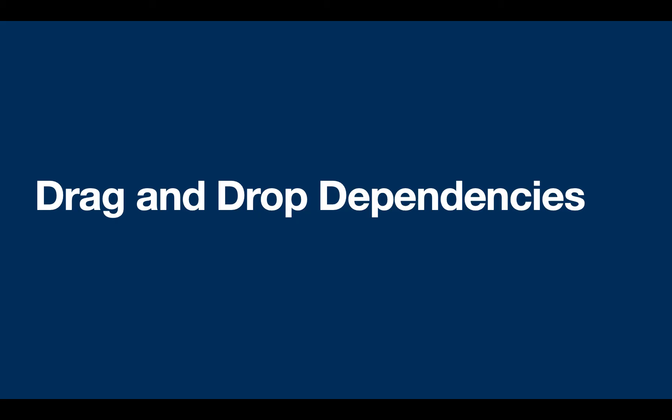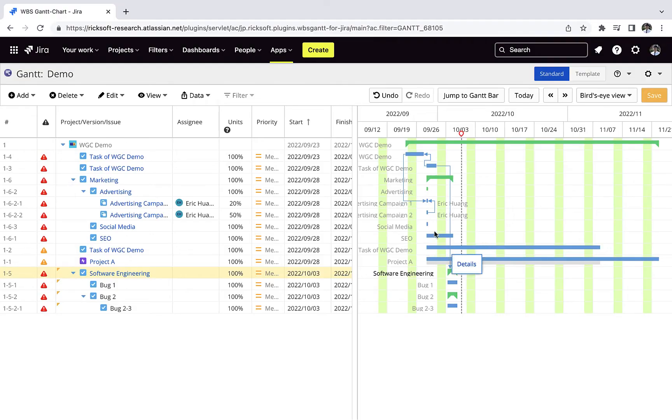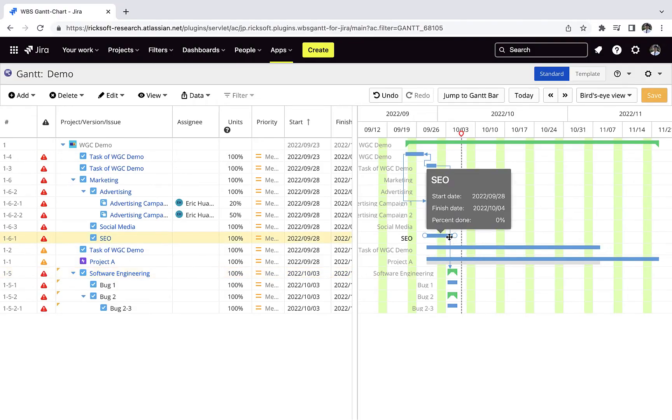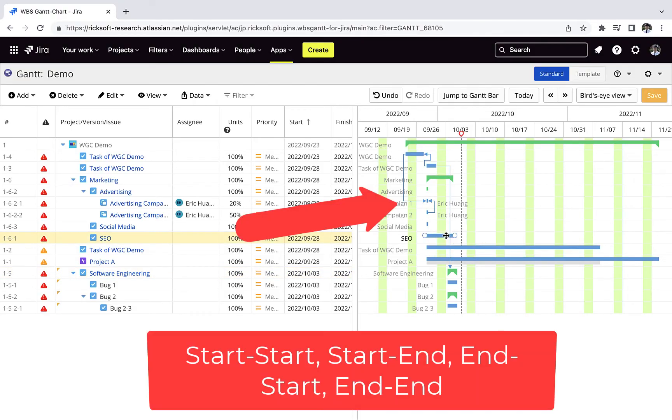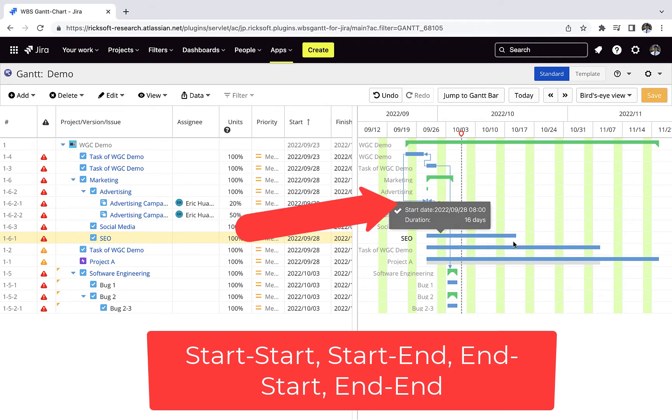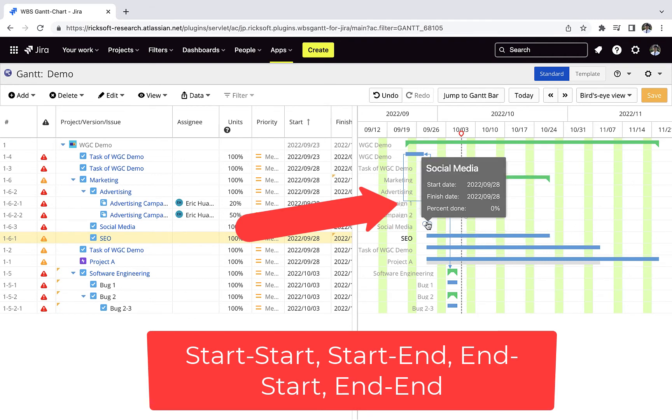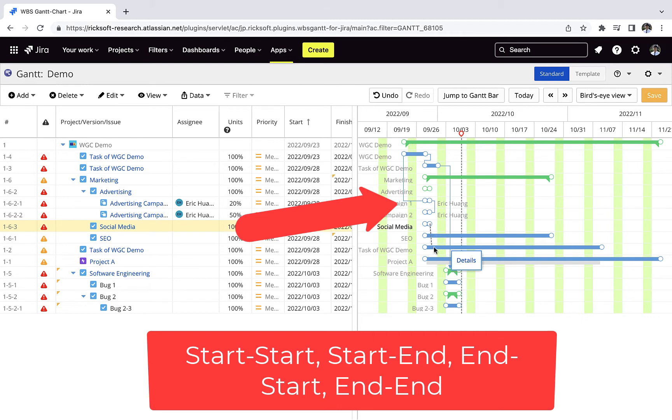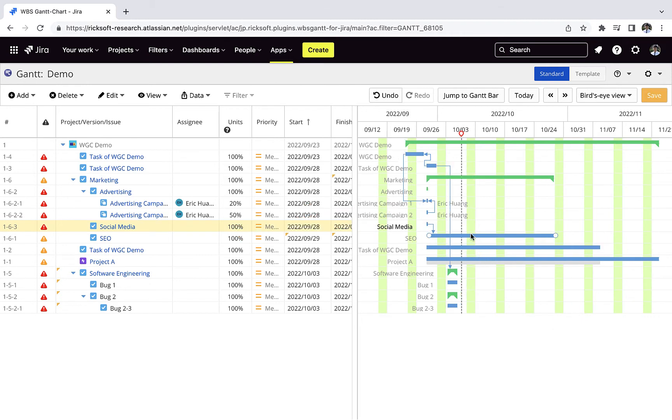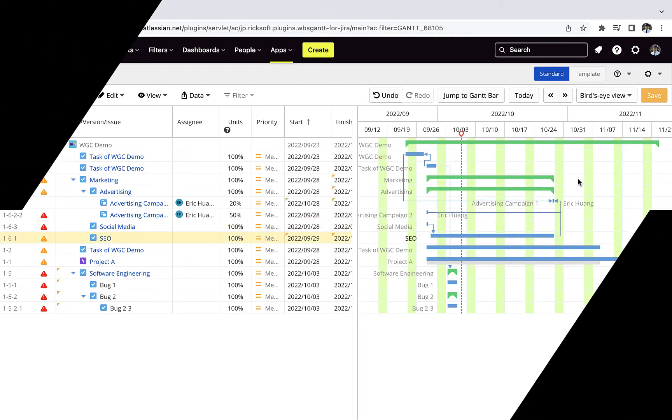You can drag and drop your dependencies by clicking and dropping. You have the option from start to start, start to end, end to end, and end to start. You can change your task duration with the slider as well.